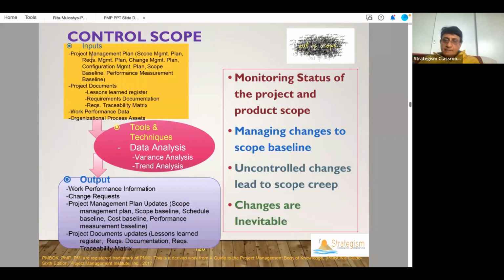So you have the plan and documents, and as a project manager, you monitor the status. You don't like all the changes. Some changes are just throwing uncontrollable and throwing your project away. You stop that from happening. Good changes which will improve the product, which are within the constraints of time and money, you go back and request for change request from the stakeholders.